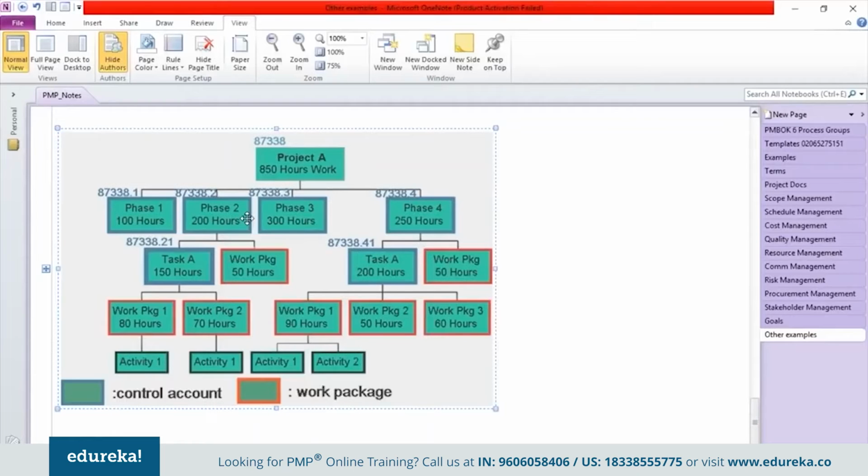So depending on what approach you have decided, you can use that high level template and create the work breakdown structure. As you can see here, you have broken down your phases into various work packages, and those work packages are broken down into activities. If requirement is a phase that you're working on, then requirement gathering could be one of the activities, and the work package could be to create the requirement specification document. Activities could further be broken into various tasks as well.